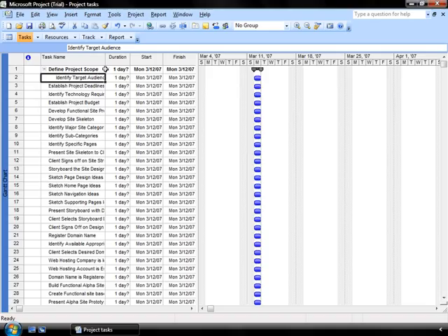Now you'll notice it's a summary task because it's bolded. It has an indicator at the top beginning of the task, which will allow you to collapse or expand the series of steps within that phase or task. And also in your Gantt chart, it gives a different indicator over here where you now see a larger black line in your Gantt chart with a particular start and end date, whereas the task step that's below it is still in your regular blue outline.